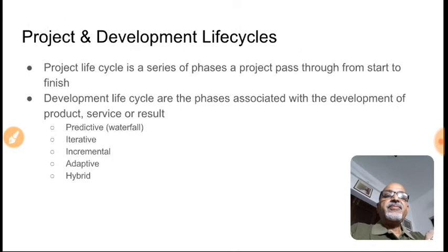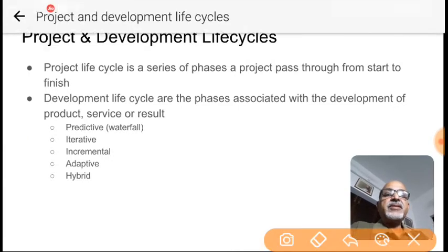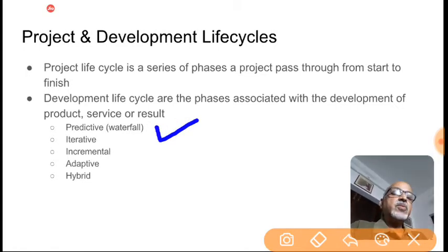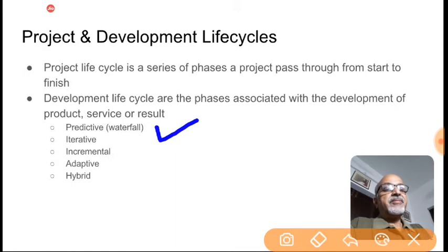Then again, the development life cycle can be further categorized into predictive styles. It is also known as waterfall, where things happen sequentially. Requirements collection happens, then a sign off. After that, we get into design, again sign off, then development based on the design, then a sign off, then parallel run and handover. So this is a predictive style. Budgets, timeline, everything is decided up front, and the project planning also happens in detail from the start point of the project till the end, and then we try to do things. That is a typical waterfall model, also known as predictive styles.